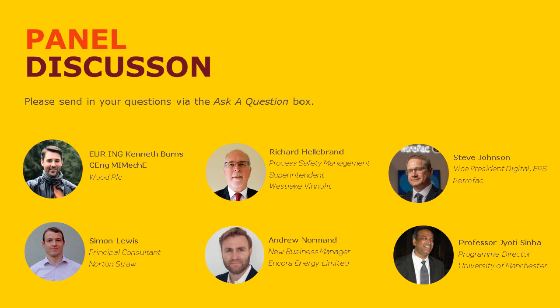So there's a range of things you can do, and in the case of the case study, we couldn't do a significant redesign and get long lead items in like pressure vessels, which would have been pulsation dampers. But yes, the best way is to eradicate the input and the failure mode. In this case, what we're doing is a stick of plaster, and we're using soft packers and things like that to arrest vibration rather than remove it. But in an actual design of a system, you would recognize that and you would buy components. So you're right, John, you do that.